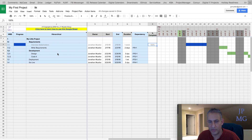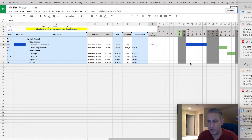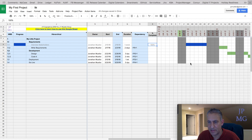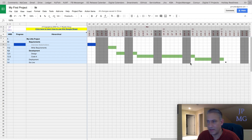We'll talk about sparklines in a future video, but the key is: a completed task shows up as gray, a parent task shows up as bold, a child task that's not complete shows up in regular black font, and a milestone shows up as a diamond.